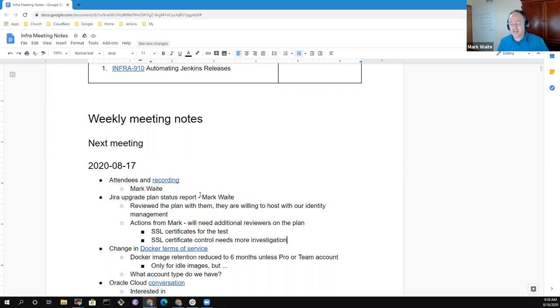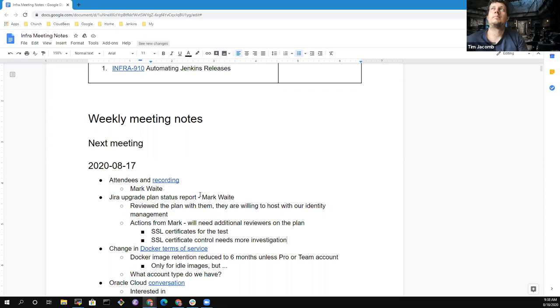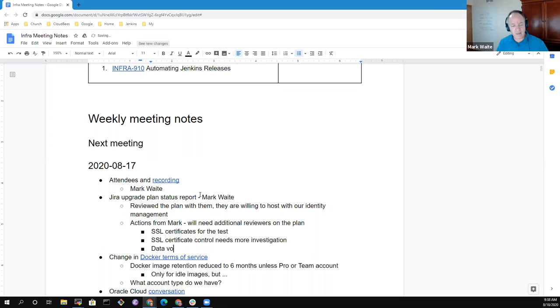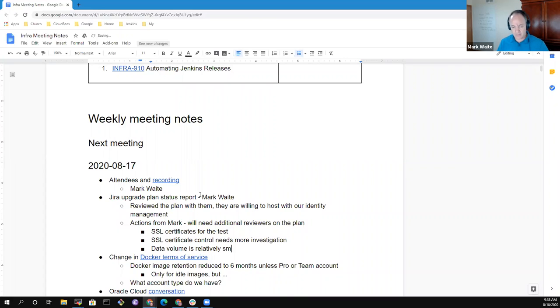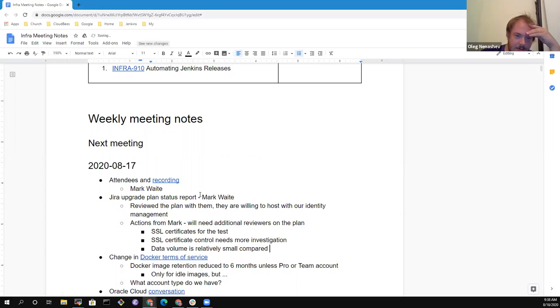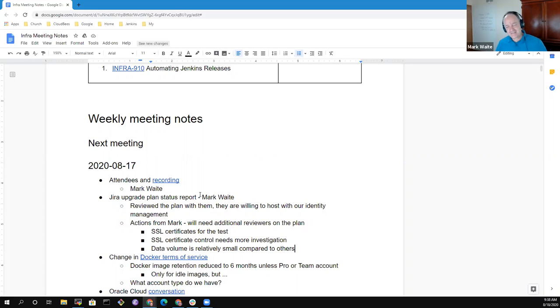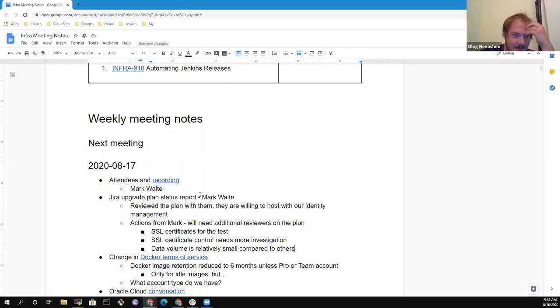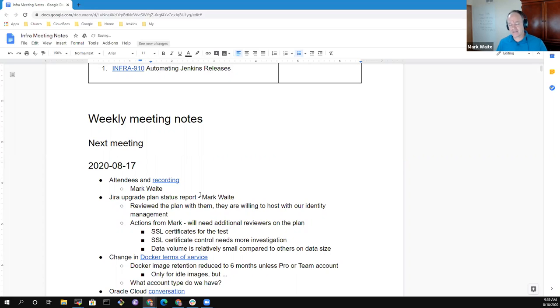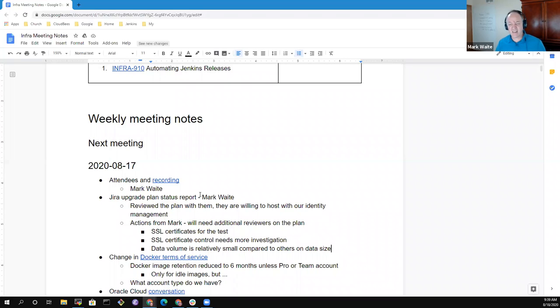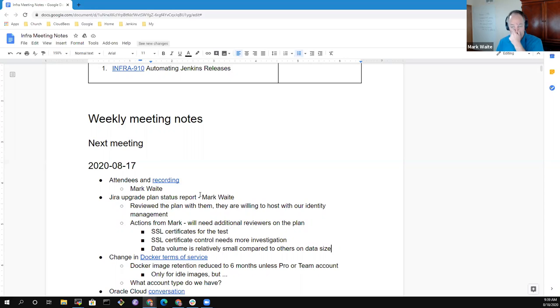So actions from Mark. I will need additional reviewers on the plan. There are some specific questions around SSL certificates for the test drive and SSL certificates for the final destination, because right now we own the jenkins-ci.org domain completely, and we control it correctly. But they will be running a server that is in that domain. They said that they can use Let's Encrypt, and that is their preference. Our data volume is not of any great worry to them at all, compared to some others that they've transitioned. We look small. They looked at the data size and said, no, we can transfer that data very easily over the network.